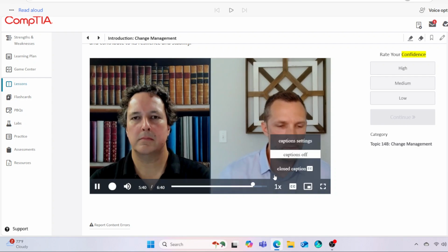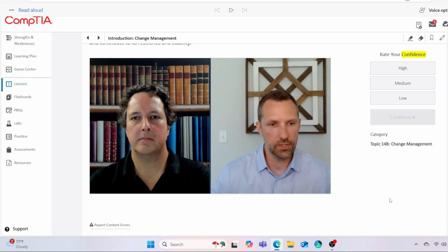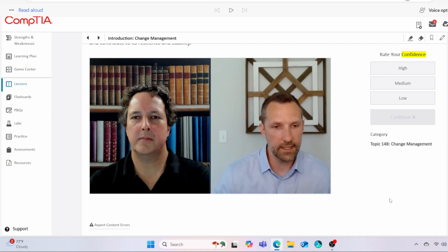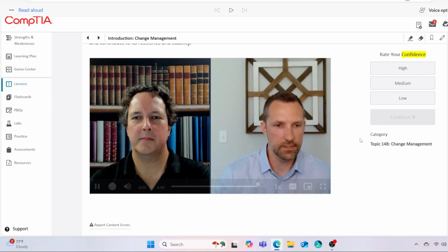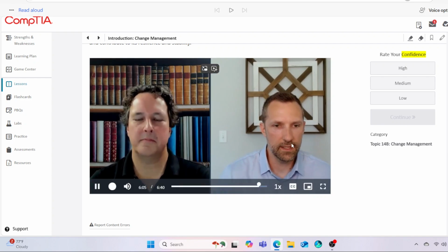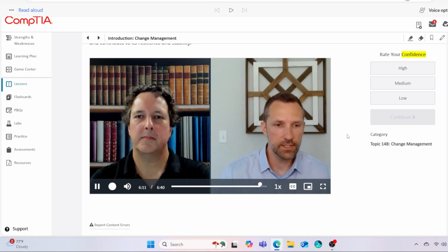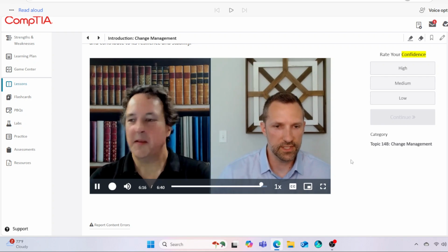Then we'd all get together and we'd literally go through the list and say, okay, well, this particular head of the organization is requesting this change. Do we approve it? Do we deny it? What is the reason for us approving or denying it? We would occasionally bring folks in to give us a little bit of an explanation as to why they wanted the change made, maybe a network diagram, something along those lines. So it varies, but as long as it's documented in some way that you can go back and clearly see when it was requested, why it was requested, who requested it, whether it was approved, denied, and what the reasoning was behind it, you're well on your way to a successful change management process for sure.